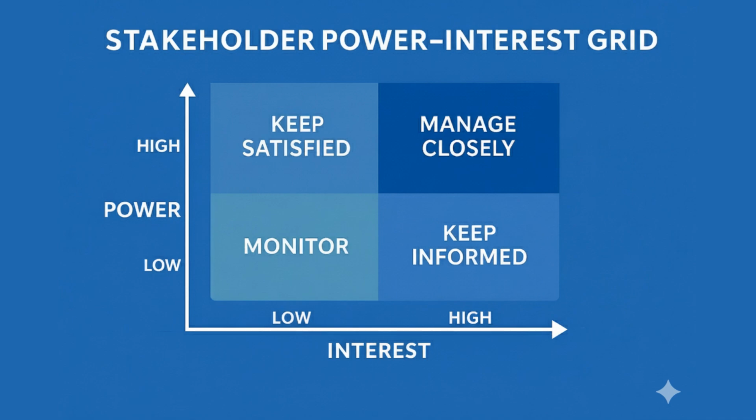For the identified list of stakeholders, one of the primary functions of the project manager is to keep them engaged, to keep them involved in the project. You need to identify all the stakeholders as early as possible in the project. We all know that late changes will bring project delay. Let us assume that you have missed identifying a particular stakeholder and you identify him in the middle of the project, and he comes up with a very complex new requirement which is going to bring about a rework in the project. You need to always keep the stakeholders involved in the project.